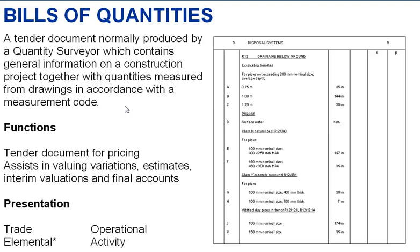So what is a Bill of Quantities? It's a tender document normally produced by a quantity surveyor which contains general information on a construction project, together with quantities measured from drawings in accordance with a measurement code. In Ireland, the general measurement code would be the ARM, the Agreed Rules of Measurement.